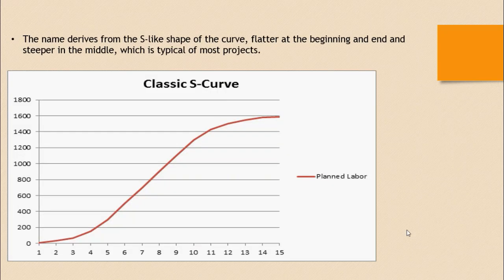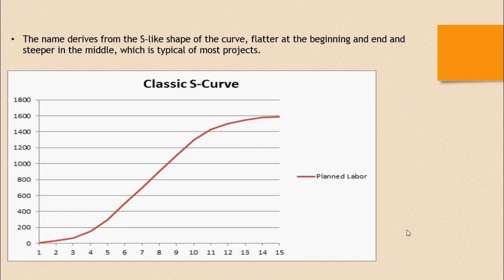The name S-Curve derives from its shape: it is steeper at the middle, flatter at the end, and flatter at the beginning. Flat at the end represents the project decelerating towards its end. Flat at the beginning represents the project starting and accelerating towards the steeper middle, meaning the project is ramping up towards the end as per the plan.